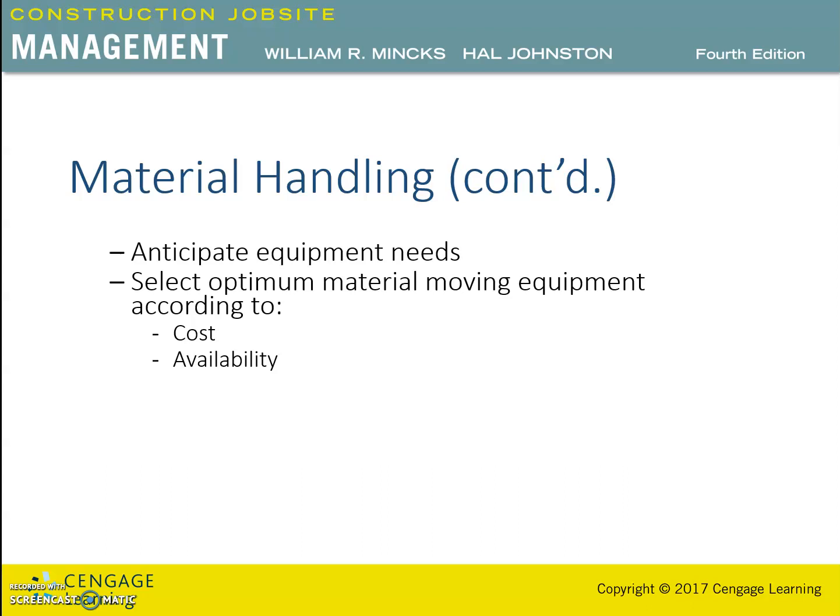A one-time lift may appear to require a piece of equipment that is not readily available within the community. Any piece of equipment can be shipped to a community, but the shipping cost may greatly exceed the cost of an alternative. Sometimes for small lifts, a pole with a block and tackle can replace a crane that is not available in the area.